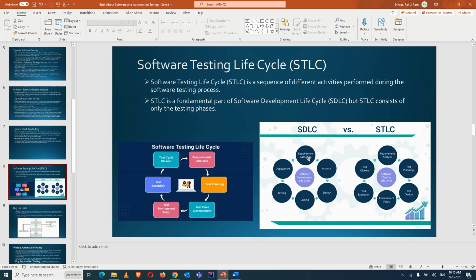If any developer or tester is going on leave for some days in the future, we have to count that also at the time of analysis. That tester will not be there, so we will only have this much man working hours, and based on that we will take the requirements for that particular sprint and proceed further. Otherwise we will say that we will not be able to achieve that much requirement in such a short span of time, and maybe we can send them back to the backlog. We call it the backlog, which we will develop in the next sprint. That we also do at the time of analysis.